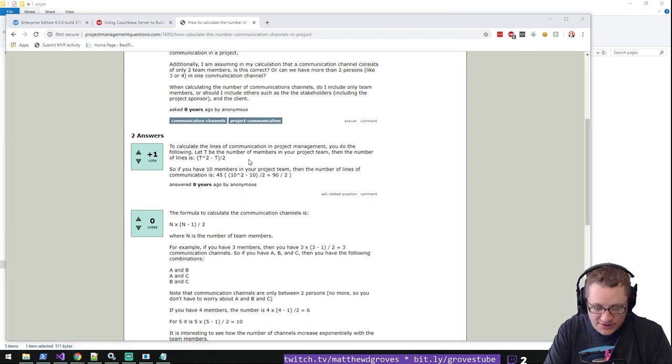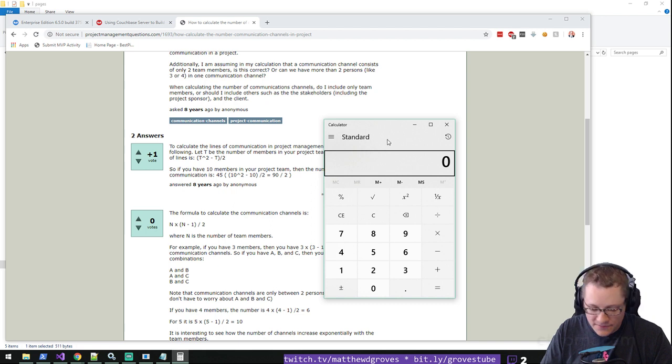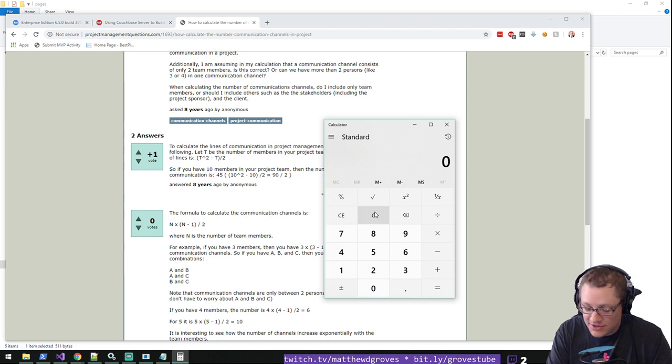So if you have 4 members of your team, 4 times 4 is 16. Minus 4 is 12, divided by 2. So there's 6 lines of communication total between all those 4 members. I think that's right. Now we've gone to 5 members.